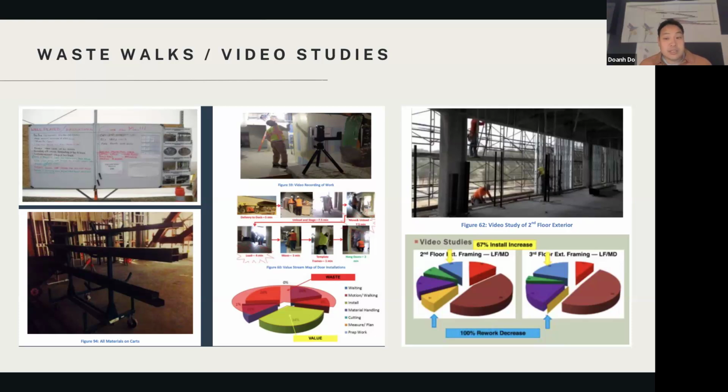So typically, you're gonna find 60 to 80% waste, and that's okay. That's a good thing, because once you have the waste, then you can categorize it into 3 categories, right? Value added, non-value added but necessary, and also waste. Then you eliminate the waste and you reduce the non-value added but necessary. And this is how you improve your projects over time. But when we have that consistency, we can then do these studies to look at productivity and look at ways to improve it. So that's why I would say that if you have lower skill labor, you're going to benefit more from having this process.